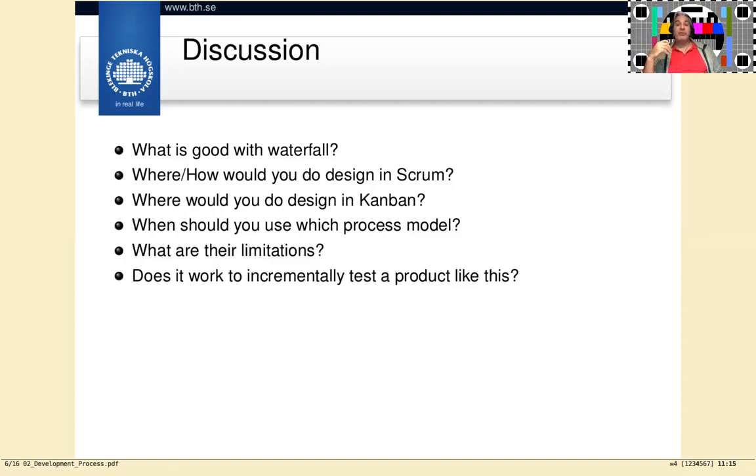If you have something that you're going to be working on for a longer period of time, and you might not have these collective starting points as clearly cut out, then Kanban might be a good idea. Taking care of support tickets as they come in, for example, would be a very good example of a Kanban flow.